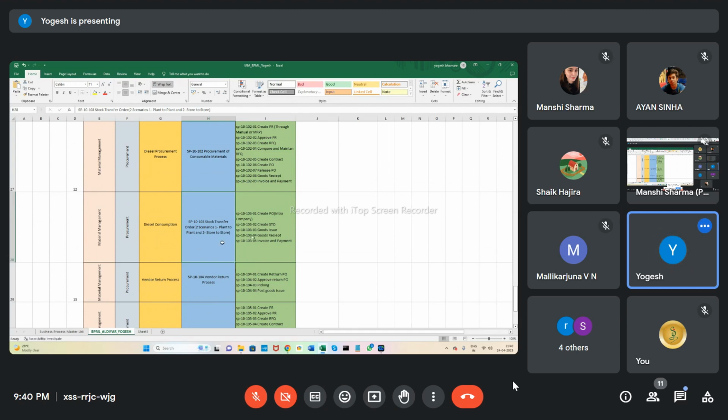which comes under the two scenarios I already mentioned. There is also a process mentioned in the business scope document, the mobile tanker replenishing another mobile tanker. To manage this scenario in SAP, a storage location is configured named mobile tanker, because in SAP no such mobile tanker exists. So they created a storage location mobile tanker, customized it, and assigned it to the stationary tanker. I think there are 8 mobile tankers under the name of the storage location. So any mobile tanker can be filled from any stationary tank by store to store goods transfer.